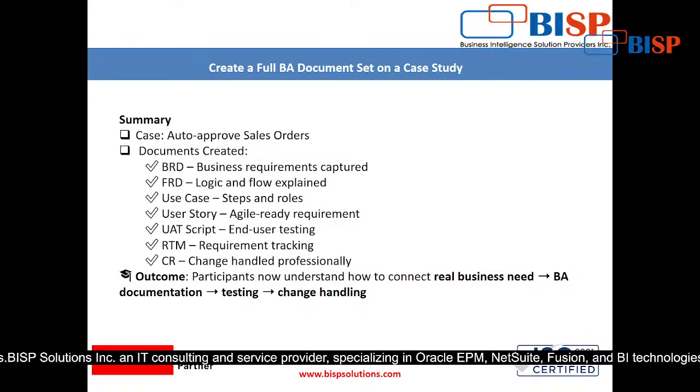Now in this testing process, again it will take 1 or 2 weeks, right? Many times, if the project is a remote project, and that depends on the project, because when you give any document to the client side for testing, it is not necessary that you will get the response immediately. Okay, so the testing will take near about 2 weeks.